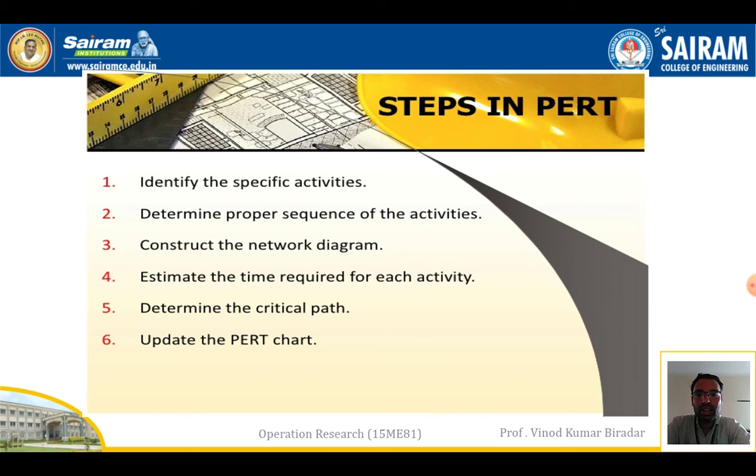First we have to identify the activities in the given project or given work or given task. Next, from the given activities, you have to make a proper sequence of activities. Next, construct the network diagram based on the given activity sequence. Then estimate the time required for each activity, how much time it will take.